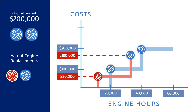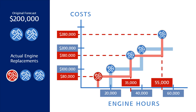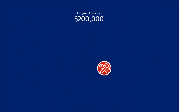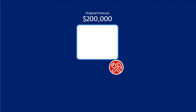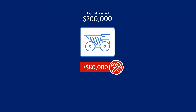However, with this one early failure, we now require three engines over its planned life. A second engine is needed at 35,000 hours and a third at 55,000. That is a cost overrun of $80,000 on a single component on a single asset.